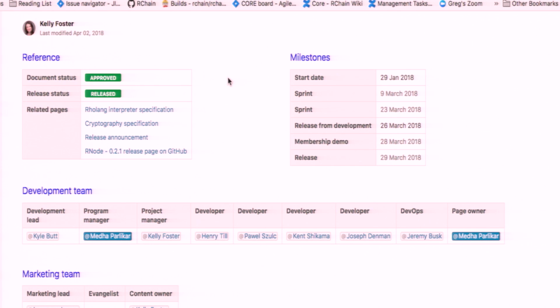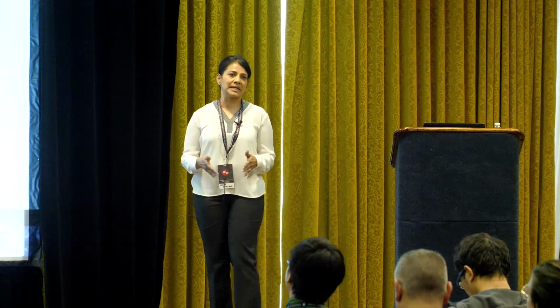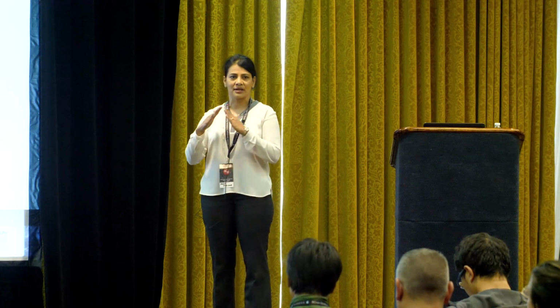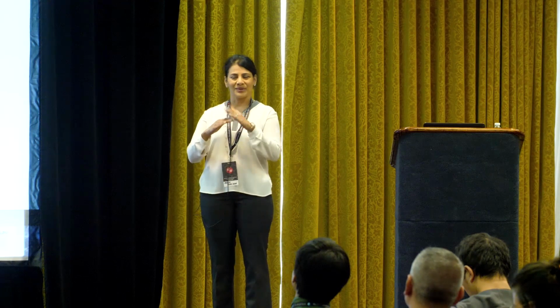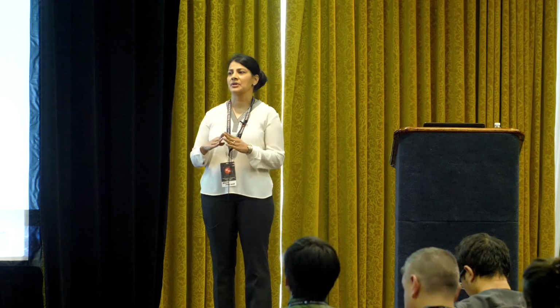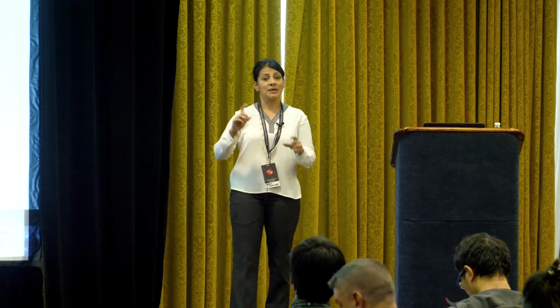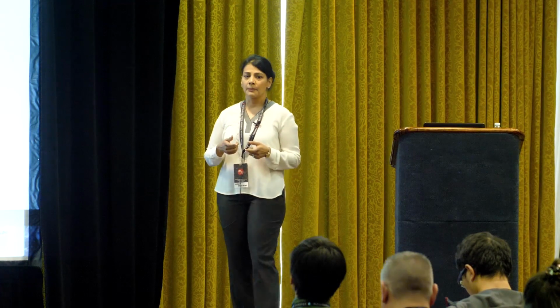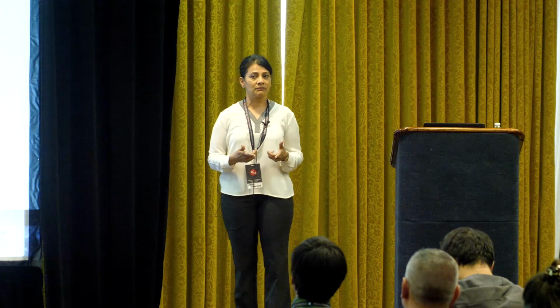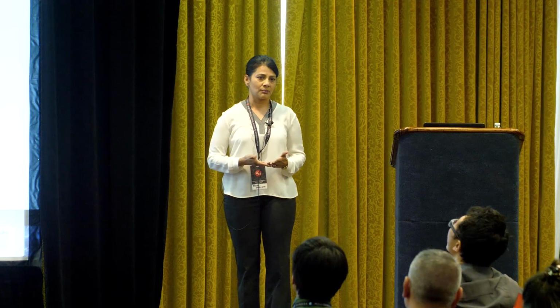You typically hear that when you're planning releases, getting to scope completeness and hitting your dates, you're going to get to pick between which piece of the triangle you want. We've decided that we're going to ship something on target every month. There may be minor adjustments to the scope, and those features that don't make it in by those 2 iterations will simply just roll over to the next release, right?